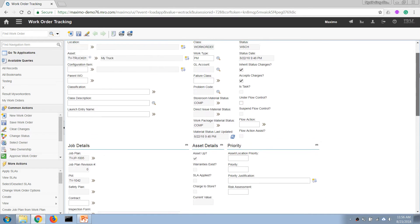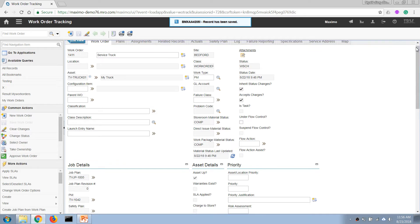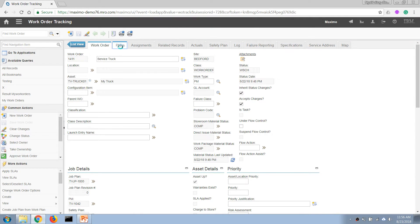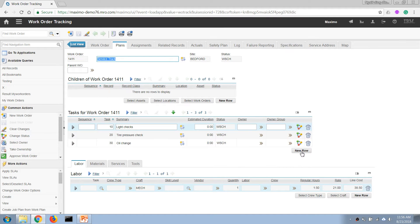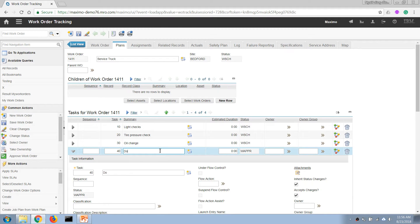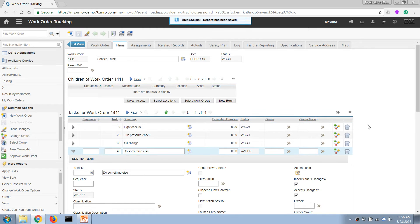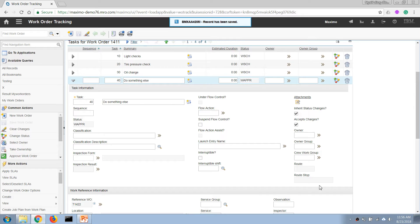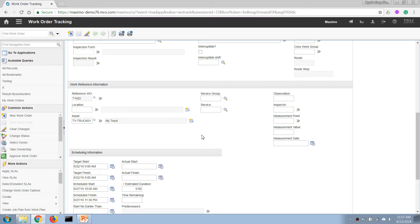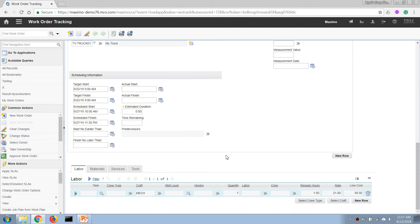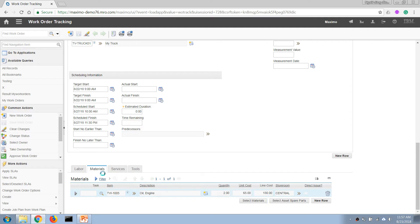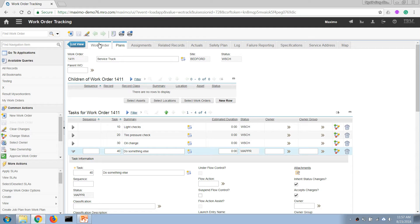That's how we enter the scheduled start and finish date. If we have some specific requirements, we can add to our job plans here. This section is generally referred to as the work plan — it is a copy of the job plan and is not linked to the standard job plan, meaning we can edit it and changes only affect this work order. We can add new labor and new materials for this job as well.